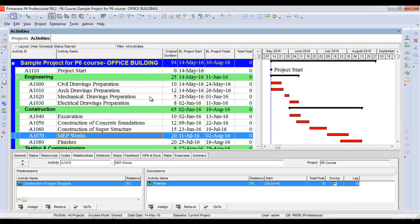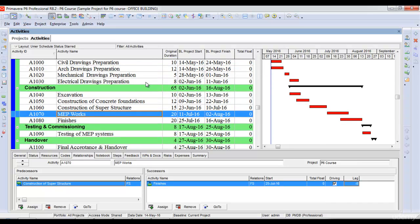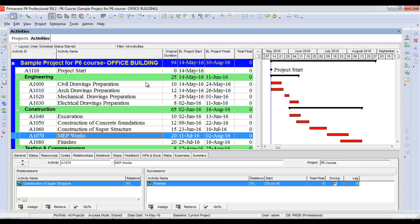You can see that introducing lags reduced my project duration from 124 days to 94 days. Now you know how to create logic relationships between activities. In our next lecture, we'll see how to look at the critical path of the project.